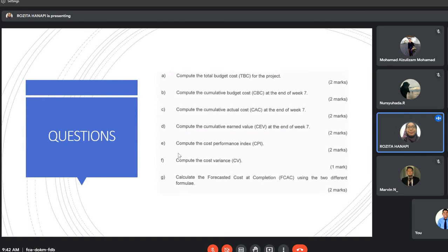Okay, so CAC is 903. The answer is 903,000. Divide 815,500 by 903,000. Okay, so the answer is 0.90. Okay, so 0.90 indicates what?